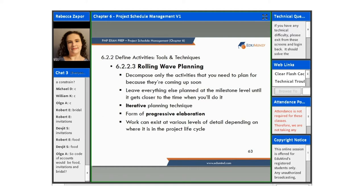Our next tool and technique is rolling wave planning, and this helps you to decompose only the activities that you need to plan for because they're coming up soon. This would be used a lot in an adaptive type of environment. It leaves everything else planned at the milestone level until it gets closer to the time when you'll do it, and then that's when you get into the more granular detail. It is an iterative planning technique and a form of progressive elaboration.